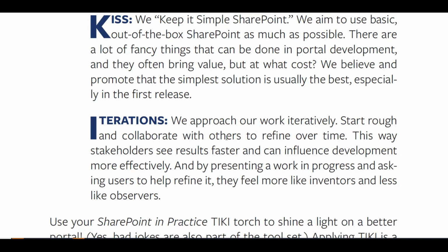Collaborate with others. Back to that first I, which was involve your users. The iterations give you a chance to build something simple before you get too far into it. Show it to users and say, hey, this is for you to pick holes in. I didn't put much effort into it. Go ahead and critique it. And so people see the results faster and they can influence that development more effectively.